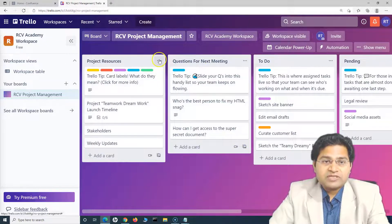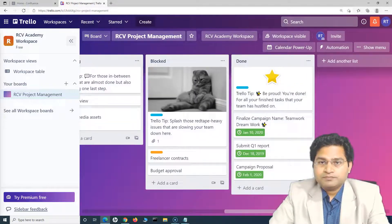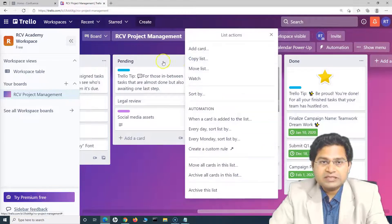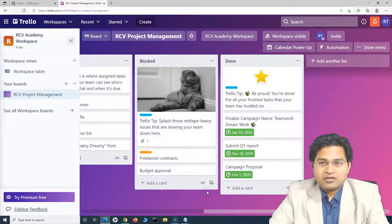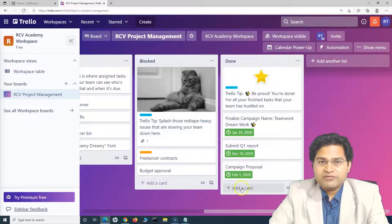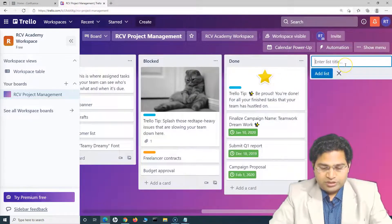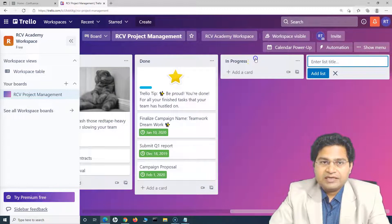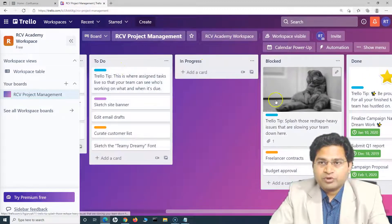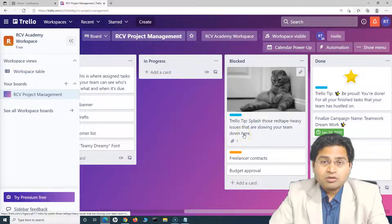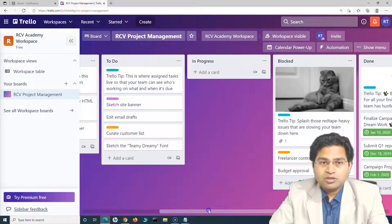If you don't want certain columns, for example, I can click on the ellipses on a list and archive it. Then I can add a new list — say, 'In Progress' — and move it after 'To Do.' So the workflow becomes: To Do → In Progress → Blocked → Done. As a project manager, you open a card, search for a team member, assign the task, and close it. Once assigned, that person will start working and move the card to In Progress.